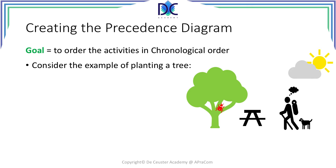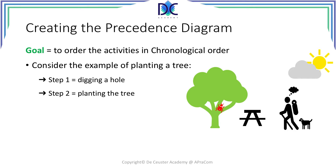Let's consider a simple example of planting a tree. The first step before we can plant a tree is digging a hole — we need the hole to put the new tree in. Step 2: we will plant the tree, so once the hole is finished we plant the tree. And the third step, we fill up the hole, which means that our little project is finished.